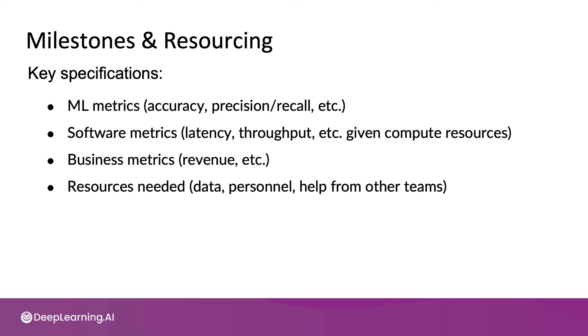In addition, writing out the resources needed: how much data from which teams, personnel, any help you need from cross-functional teams, what software integrations, data labeling support, or other support you need from other teams.